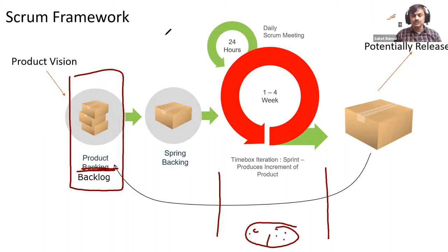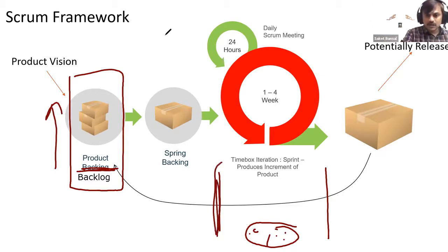Just for example, we can only do 100 days equivalent work. We can't do beyond that. Now tell me which one you want so that you get business value. That forces us to prioritize, so there will be a continuous effort to prioritize these requirements. And we say, we understand you are going to work for 2 weeks, and I understand I have an ever-growing requirement as of now. If you can finish these two things, I think we will make good use of our next 2 weeks. Great.